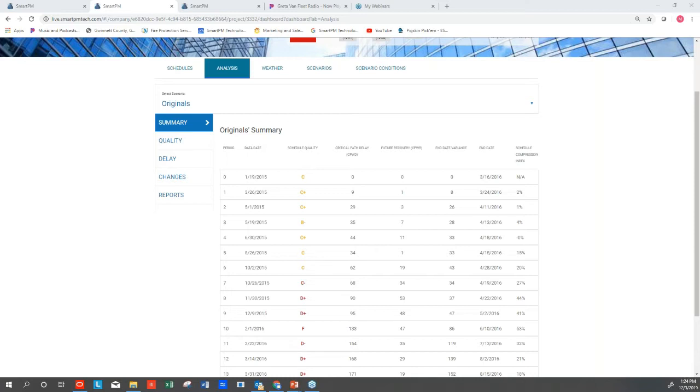It'll tell you, can you get enough resources or not? Do you need 100 and you only have 50? That's very telling stuff. But if you don't have a resource loaded schedule, you don't really have that visibility at all times.